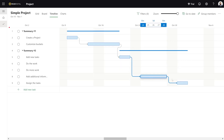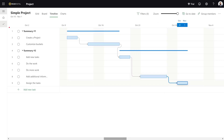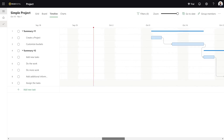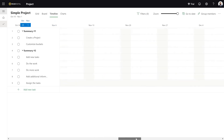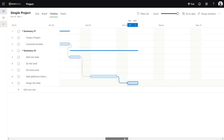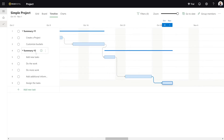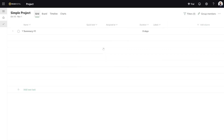And then we've got a couple gaps here. What's going on is these tasks — Do the Work and Do More Work — were never really scheduled. So if I come back here, I'm going to go to these and add days again.